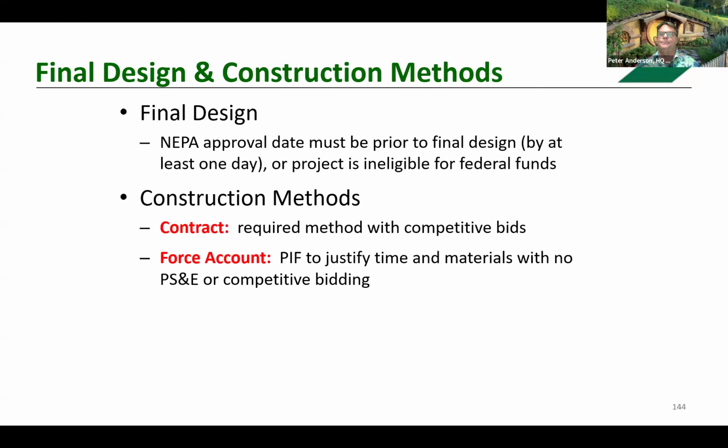Final design is any design activities following preliminary design. It expressly includes the preparation of final construction plans and detailed specifications for the performance of the construction work, which will ultimately be used in the PS&E package. So we keep talking about when you can start final design: once NEPA is completed.